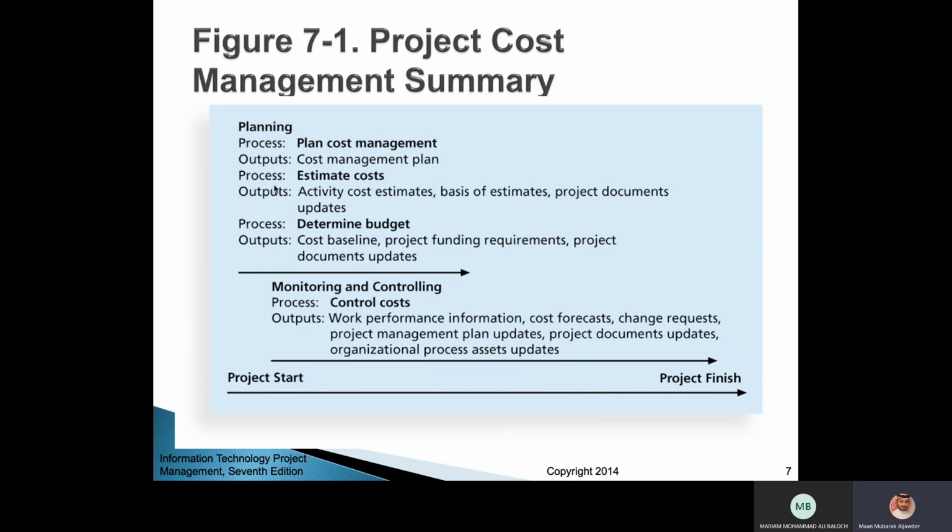Determining the budget, the output of this process will be a cost baseline. You will have something similar to a time schedule with costs assigned to each of the tasks related to the time. And I will show you this later, inshallah. Okay. Project funding requirements.